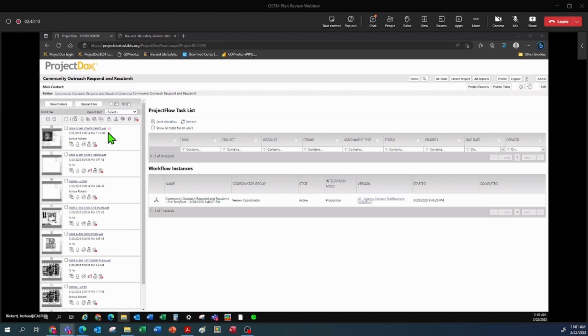If your file was blue on the upload screen after it uploaded, but you don't see a version indicator here, it means that the content of your file did not change. So it means that you probably uploaded the same file that you uploaded the first time again, and the system discards it because it doesn't version the same files with the same data. And by the same data, it will literally check down to the period at the end of a sentence to determine if the data has been changed. So when you have an issue, before you move on and complete things from our side or your side, if you see these issues, make sure you scroll through and look.